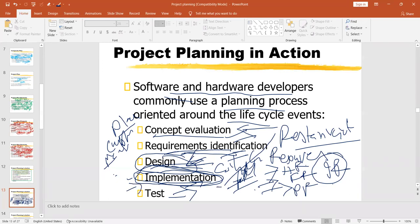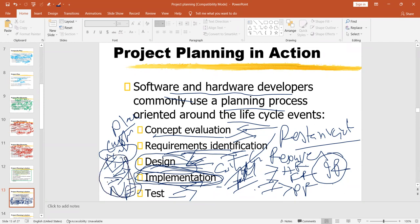When you go for implementation, you should not implement as a complete project — you need to go for the test. Suppose you have fixed some menu; you should not start preparing menus commercially right away. You have to offer the menu to family members, relatives, neighbors, and friends. If 80 to 90% reply positively, the test is all right, and then you can accept the project as a whole successful project that you can really implement. Otherwise, not.